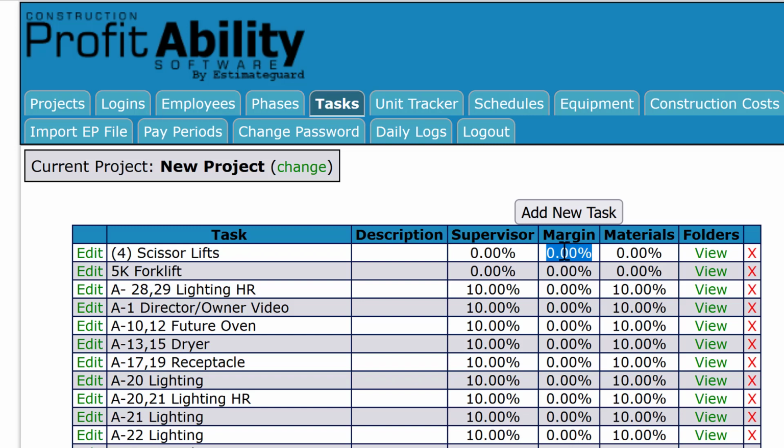One of them being that if you're doing a remodel project, and say for example you already had an existing conduit that went to a certain area that you could use for a home run, and all you needed to do is strip the wire out and make sure it was supported well and intact, you could actually deduct 25, 50%, 75% of the labor out of that task so that you weren't assigning all of the hours to build the whole conduit system since it's already in place, right?